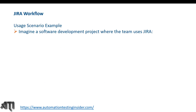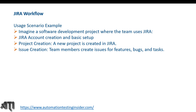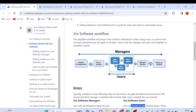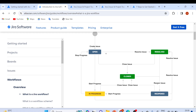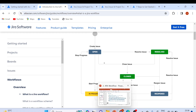Let me revise what we discussed. Imagine a software development project using Jira: first, Jira account creation and basic setup; second, project creation; third, issue creation — team members create issues for features, bugs, and tasks. Each issue progresses through a workflow from To Do to Done. The issue lifecycle is: Open, then In Progress, then Resolved, and from Resolved it can be Reopened or directly Closed.